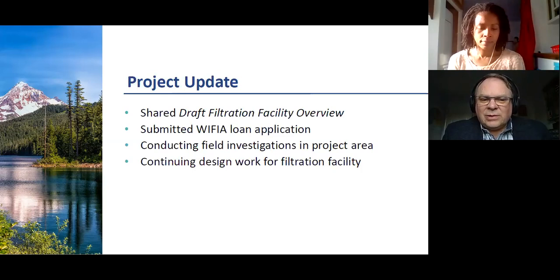Two other things that are going on. This past week, we submitted a loan application to the Environmental Protection Agency to get a low interest loan through what's called the WIFIA program, which is the Water Infrastructure Financing and Innovation Act. That application is currently starting to be processed by the EPA, and can potentially fund up to 49% of our project costs for this facility, again, with low interest loans.